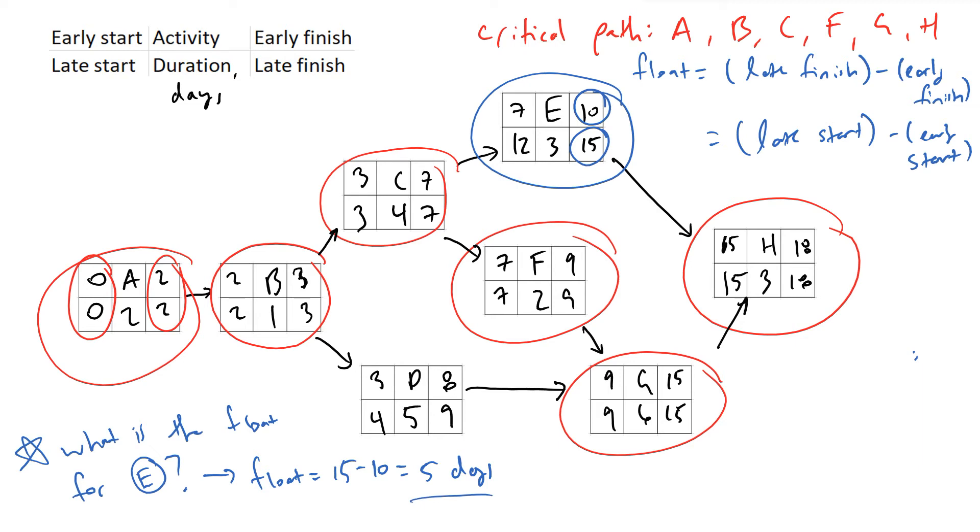And so what this 5 days tells us is that activity E can be delayed for up to 5 days and have no effect on our overall project.